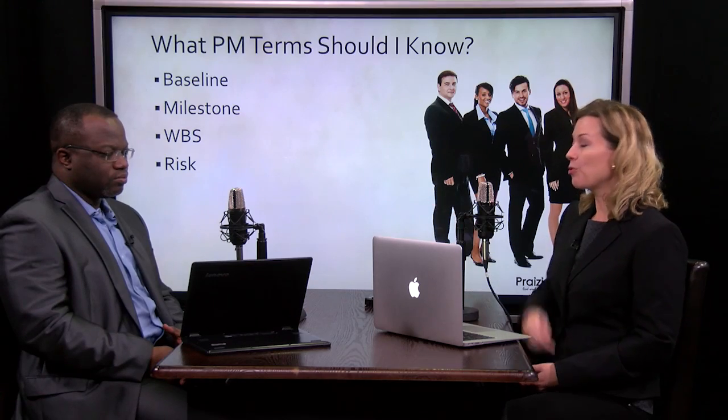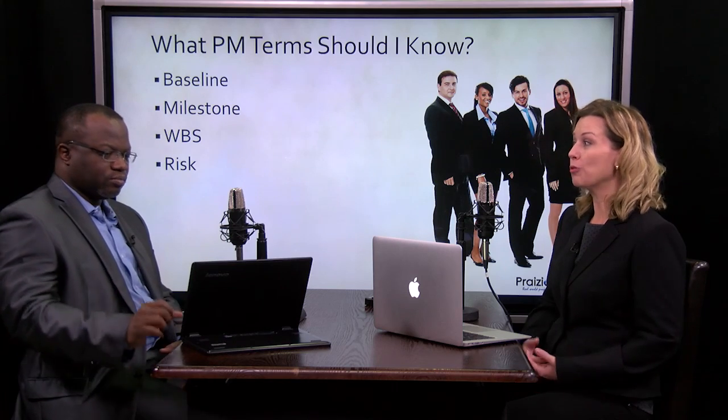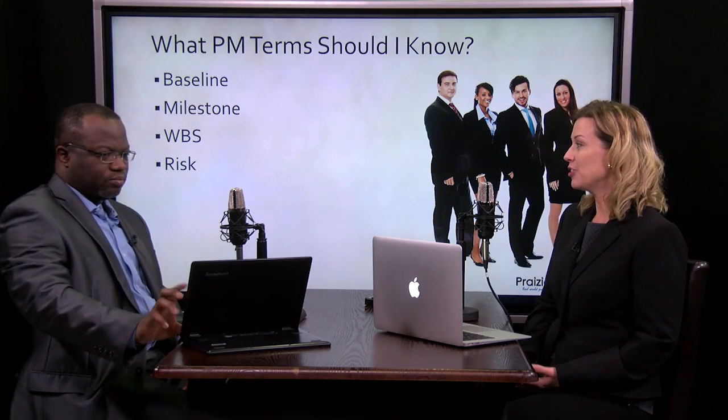You might not have it all broken down, but it allows you to be confident that when the time comes, you will be able to take that big chunk of work and break it down into activities or tasks that you can associate with resources. And the WBS is a wonderful foundation for your schedule, for your cost, but also to go through and identify what risks are evident in your project.